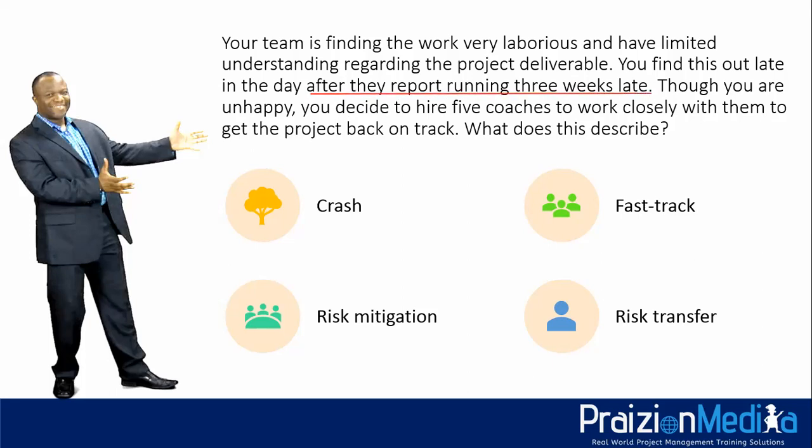They're not saying we might be 3 weeks late. They're telling you we are. So it's not a risk. So anything to do with risk, we're going to cut those out, right? So it's nothing risk related. The action cannot be risk transfer because that should have happened before the risk occurred. Get it? So risk actions like mitigation, transfer, avoid, they happen before the risk. In this case, this already happened.